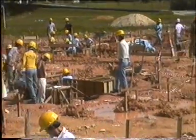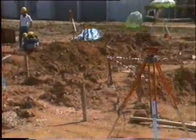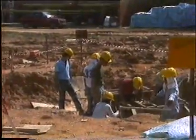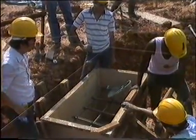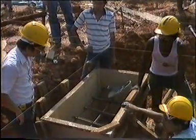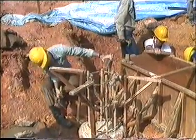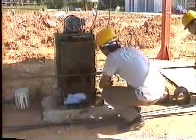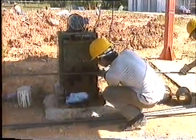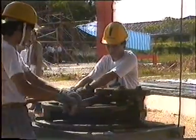The first task of the actual construction consists of setting out and building the temporary footings at the corners of the roof structures. You can see some of our team members fabricating the wooden formwork for the footings, while other students are preparing and checking the level of the reinforcement rods at the top of the piles. Meanwhile, some other students are getting ready the steel reinforcement bars, which have to be cut and bent according to the design drawings.